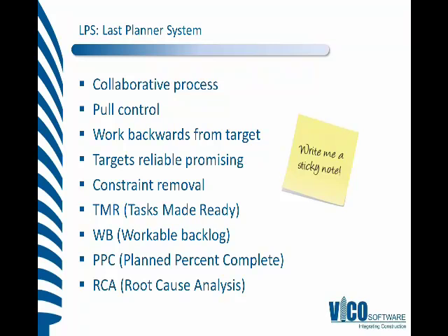Plan % complete is a very simple metric that allows us to say how many assignments did we have in the previous week, and how many did we actually complete as planned. It's a very powerful way of sharing a simple number per responsible person, per Last Planner, to then track their progress in reliable promising.